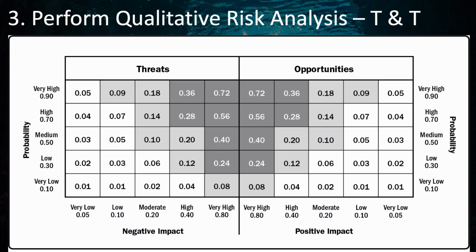As you determine your impact levels, make sure that you choose objective metrics. For example, you could use the amount of money lost or gained in the case of positive impacts. Low impact could be anything over $1,000. Medium impact could be anything over $10,000, and high impact could be anything over $100,000. The amounts you choose should be tailored to your project. You could also factor in things like health, safety, and environmental impact, but keep the metrics objective and quantifiable.